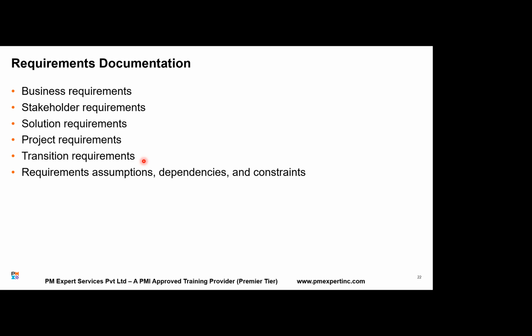After the new system is stable, will you destroy the parallel environment in the old legacy system or not? Yeah, you shut it down. So any kind of temporary requirement is a transition requirement. Only for the transition period, you will have that requirement in place. Once the transition is successful and signed off, you destroy it. Is that okay?